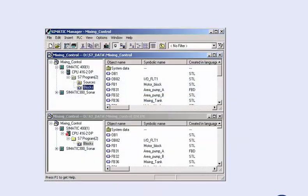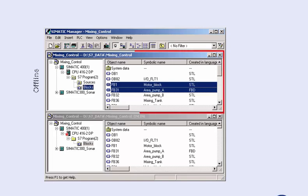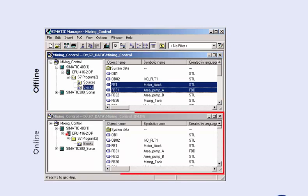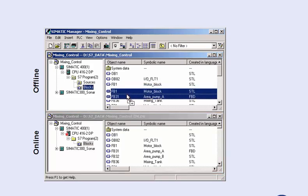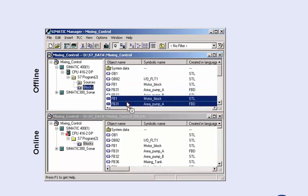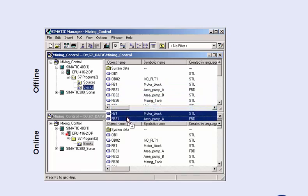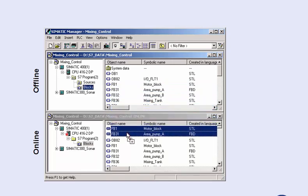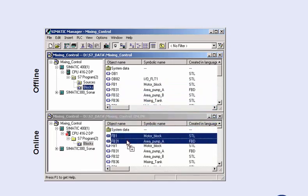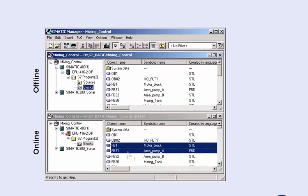If, for example, during later commissioning phases, only a selection of blocks are to be loaded into the CPU, the SIMATIC Manager gives you the opportunity of viewing the blocks on the programming device in the offline window, and the blocks in the CPU memory in the online window. With drag and drop, you drag the desired blocks from the offline window to the online window of the CPU, and perform the selective load procedure.